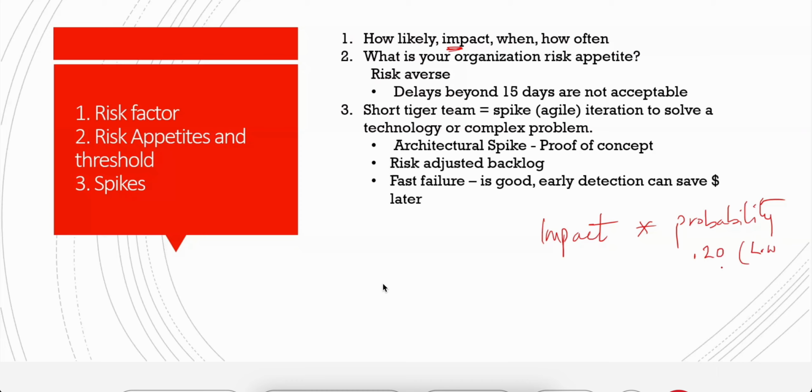That's low. But if it does strike, the impact is going to be high, qualitatively, or 0.9 quantitatively. See that? I've shown you both qualitatively and quantitatively. Probability 0.2, impact 0.9; probability low, impact high. This equals risk.